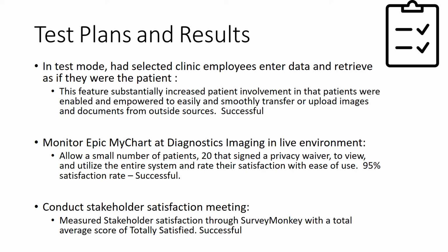Monitor EpicMyChart and diagnostics imaging in a live environment. To test this, we allowed a small number of patients, roughly 20, who signed a privacy waiver, and they viewed and utilized the entire system. They rated their satisfaction with ease after doing so. That satisfaction rate was recorded as 95%, which we deemed successful. We conducted a stakeholder satisfaction meeting, which you all may remember. We measured the stakeholder satisfaction through a SurveyMonkey tool, and the total average score ranked into totally satisfied. So we deem that as successful.